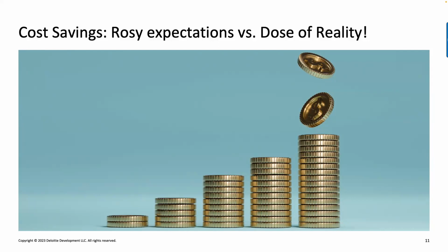So what happens with this particular example? In your business case, you put 3 months, 4 months, 6 months, reality says 1 year to migrate the workloads. If you're doing it yourself, right? Most likely customers have consultants working with them to migrate and build these platforms. That cost just doubled for this fact, right? Just on this particular instance, take this example, multiply it with other things.